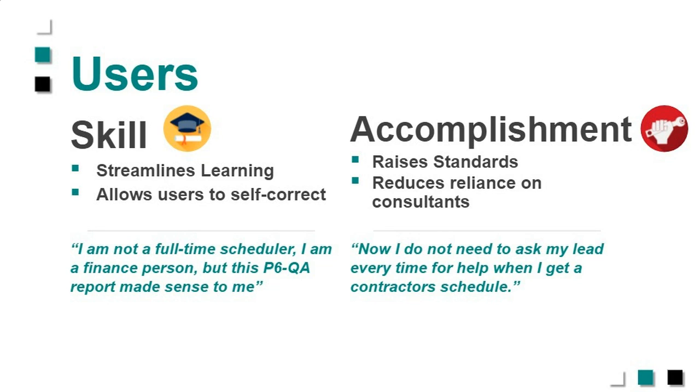Okay, so for some of our clients, they're not P6 users doing the critiquing. It's the site engineers who work with the contractors, who receive the schedule. They do the first critique. They know whether it's close enough or not, and hand it off to the schedulers if there's something they're unsure of. That makes them able to critique the schedules very quickly. And in that particular client, which I'll do in the case study, they get schedules in weekly, sometimes every 2 weeks, and worst case, every month. So their updating process is very strong, and their critiquing process is very strong.